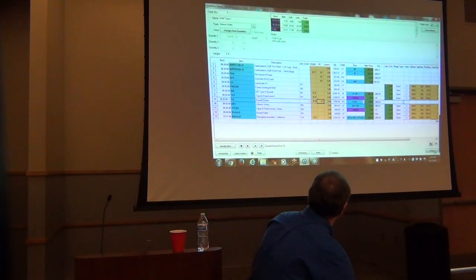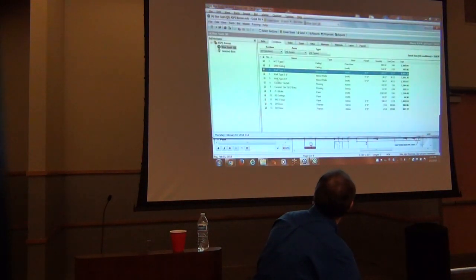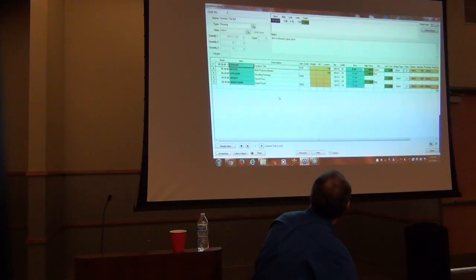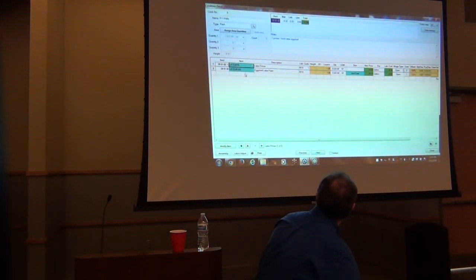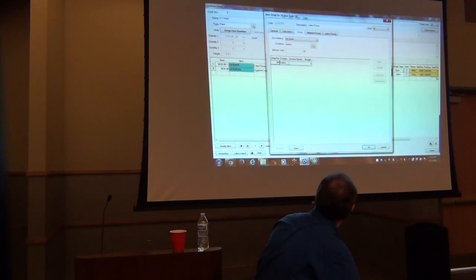And that's okay because some of you that do bid interior finishes or tenant finishes, you may need to really spread it around and have a little bit of all this in the bid. Ceramic tile, grout, tile, and mastic, labor to grout and seal it. Here's a primer and an eggshell, 2-coat system. Nothing fancy going on. All I did was tell the program, I expect 300 square feet per gallon. It's a spray coat.